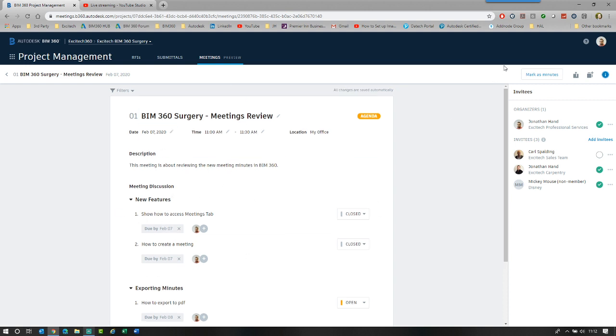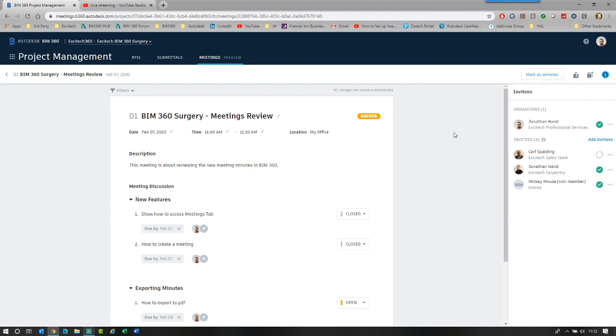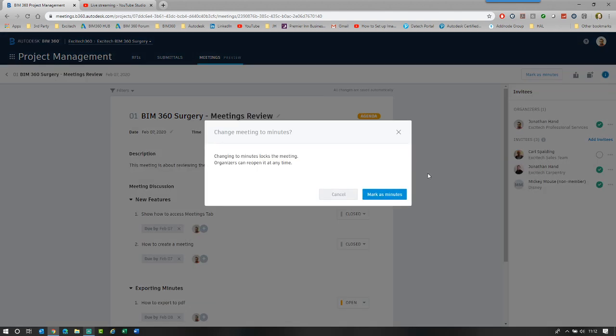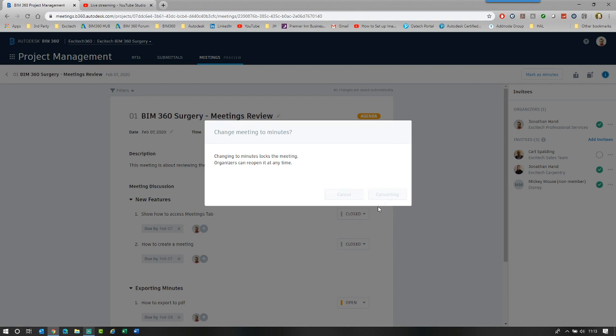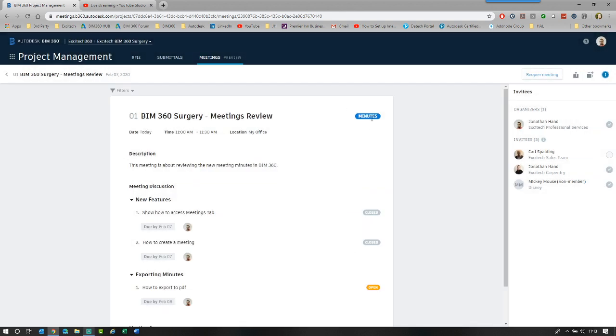There is my meeting summary and I've done everything. And what we can now do is lock the meeting and mark it as minutes. So what this does, it moves it from the agenda state to a minute state. So we've had the meeting and then it becomes locked. So if I click mark as minutes, you will see it's changing the minutes to lock the meeting. Organizers can reopen it at any time. So once the organizer does it, the members that are part of the meeting can't change it.